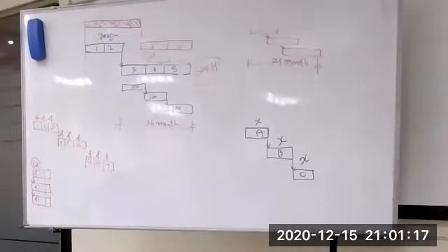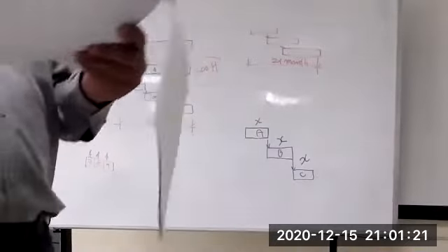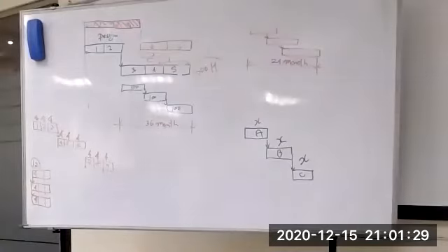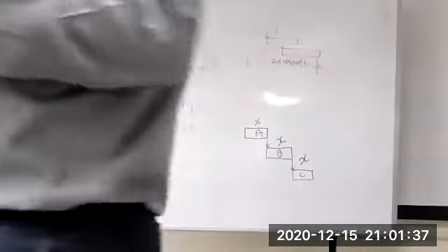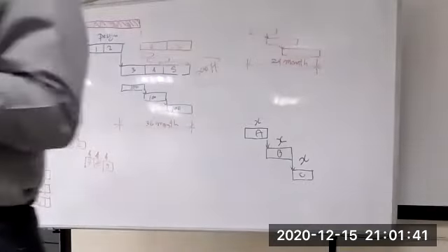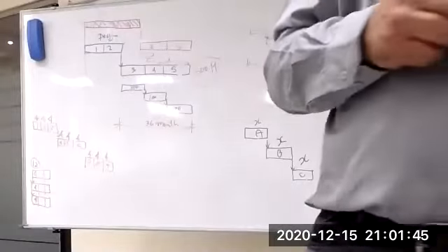We go to number 31, milestone is a significant point or event in the project. Milestone list identifies all project milestones and indicates them. A milestone can be 0 duration. If your contract has no milestones, you have to give milestones in your baseline. What do I mean by milestones in our baseline? Defined activities.